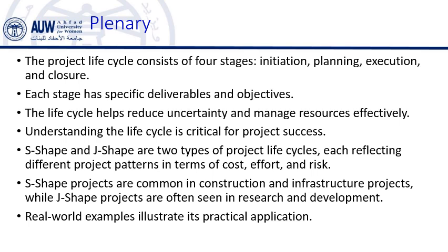While the J-shape begins with a high initial investment, followed by a decrease and then a final surge near the project's completion. This life cycle is typically seen in research and development, technology development, and innovative product launching. So building a hospital or Burj Khalifa follows the S-shape, whereas developing a new tech product like the iPhone follows the J-shape.